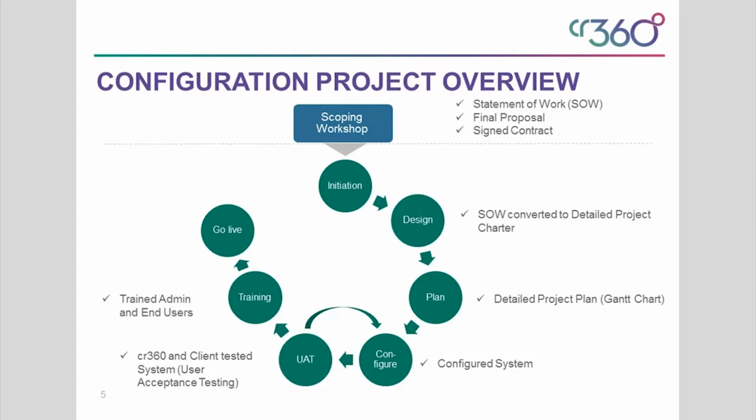That'll be a meeting where we have a project manager who'll join you, implementation consultants, and they'll talk you through the various processes that we're going to be going through, and they'll convert that statement of work document into a detailed project charter. That project charter has got all of the information that relates to the configuration project, all very nicely documented, and then we get on to the project itself.